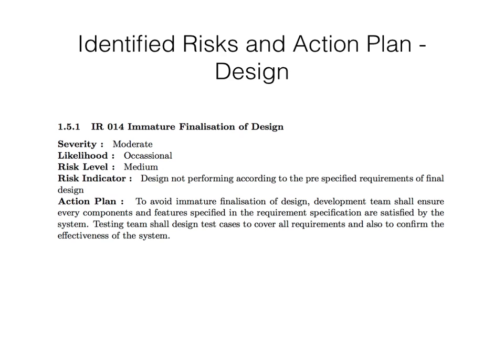To avoid or minimize this from happening, the development team should reflect on their work, and they need to ensure that all the requirements specifications are covered. The testing team can also contribute by defining test cases that test every requirement that is specified in the SRS, and therefore any anomaly or any missing requirement can be fed back to the development team.